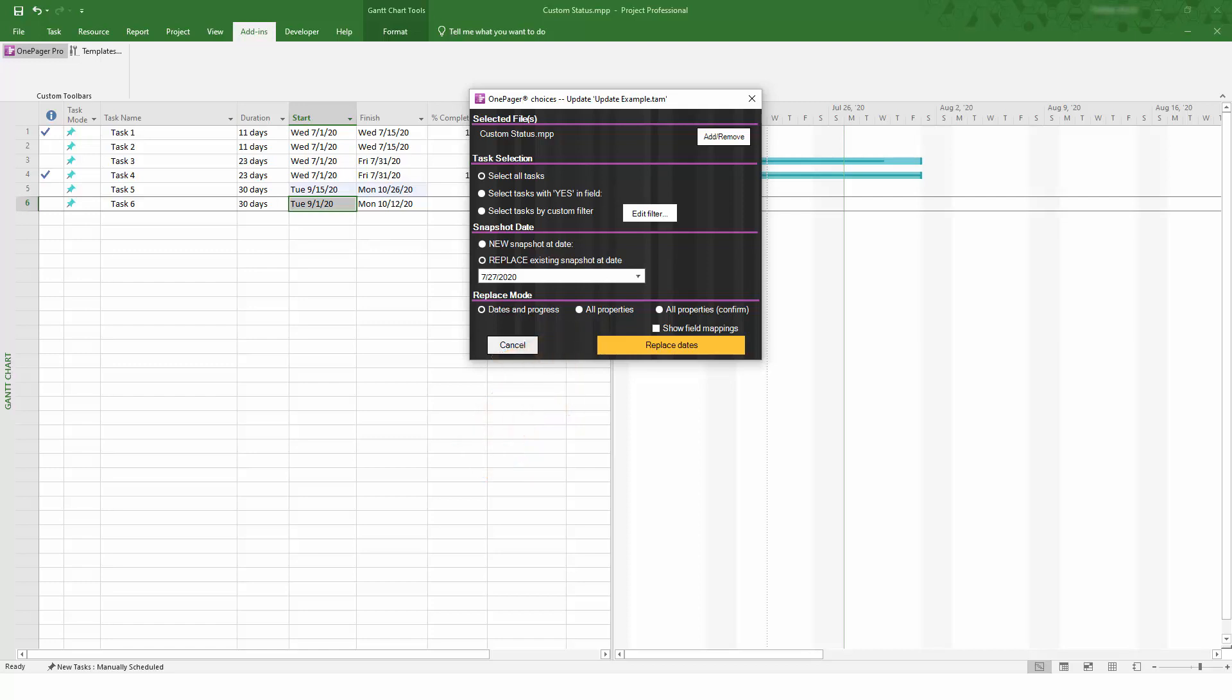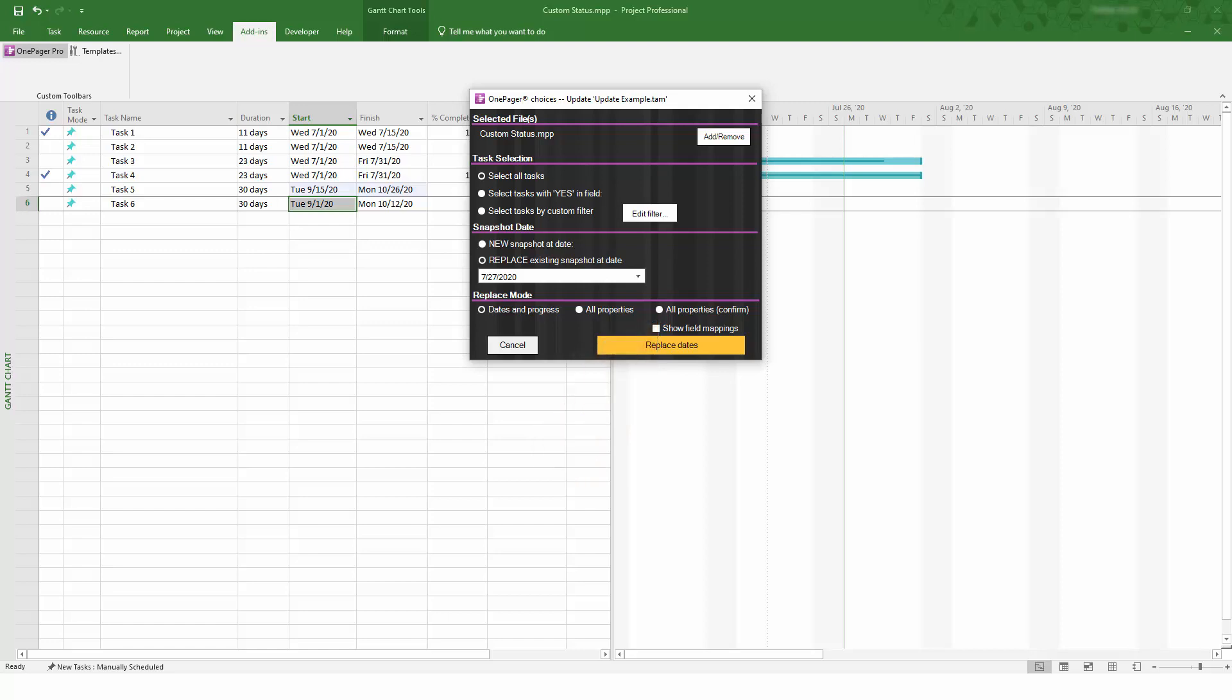So, if you've made significant structural changes to your project plan, an All Properties update might be the best choice. The Confirm option will go change by change between your source file and OnePager to determine whether you want to make an update or not. It's useful if you've made a few changes and want to review them one at a time, but if you've made a lot of changes, you probably don't want to review each change individually, so this is more of an advanced option.